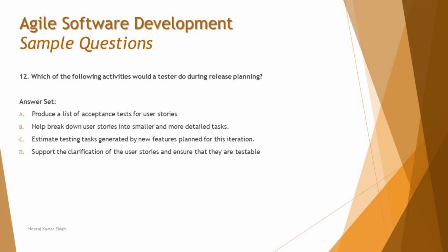That is all about, of course, iteration planning again, because estimating the work happens during the sprint planning and not during the release planning. On a high level, you can do estimations, but what are we estimating? The task. That means something you derived from user stories. And last but not the least, we are left with option D again.